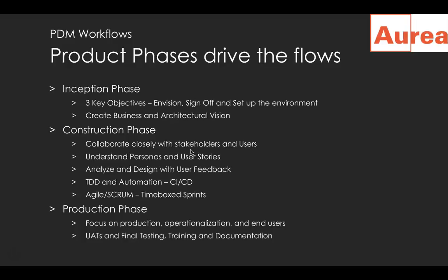If it's a greenfield product and it's a brand new development, then there needs to be an inception phase. Sometimes even legacy modernization also requires inception phases. There are three key objectives there. One is to envision the system. Secondly is to get a sign-off, so everybody says, okay, we're going to do it, and everybody is committed. And third is to set up the environment to get going.